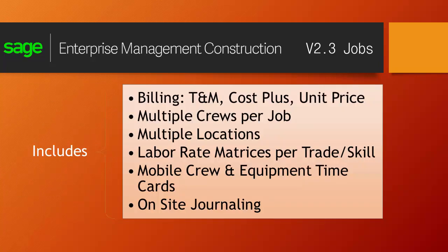We're focusing on billing, being able to support multiple crews per job at multiple locations, and labor rate matrices so that for each given trade or skill, you can have different labor rates for different conditions, and that can be set either by the employee or by the trade. So for example, you can have a base rate, an overtime rate, an at height rate, a hazardous rate, a double time rate, what have you.